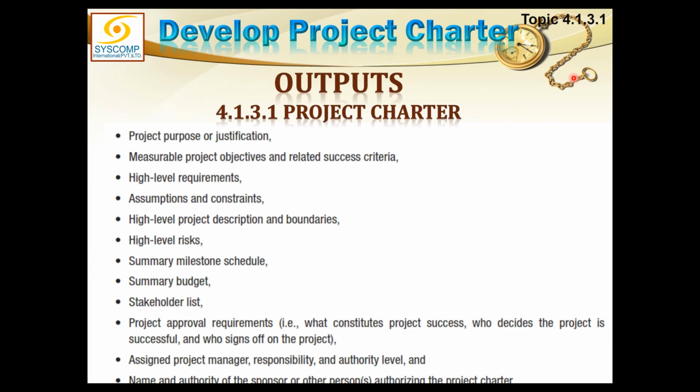First of all, I said the objectives should be measurable. I want to have a school constructed of a 3-story building, right? So I have given 3 stories as a limit, so it is measurable. And these 3 stories will also help me establish the success criteria. If the first floor is complete, I would consider 1/3 of the project to be complete or something like that. So somehow we should be able to establish success criteria based on that. Then the charter does not talk about the details. It gives you the higher level requirements. Any assumptions or constraints?